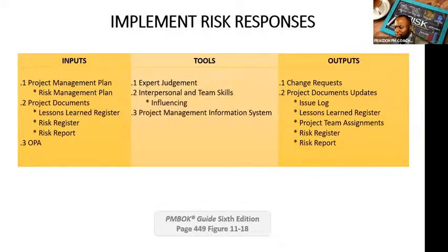So if someone says, we're going to purchase insurance for this risk, implement risk responses is actually purchasing the insurance. Whether it ends up being used in that regard or not, purchasing the insurance is really the implementation of the strategy.